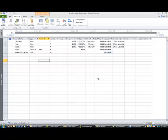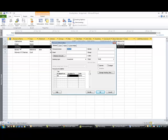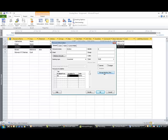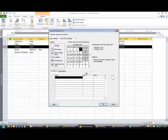The other thing that you would enter on this sheet is any details to do with each resource's holidays or training days that will affect the project. So you've been told that Andrew's on an in-house training day on the 5th of January. So if you double-click Andrew, you will get his Resource Information. So here on the right-hand side you see the Change Working Time, which is the calendar assigned to Andrew. If you click on that, you'll note up on top that he's using the Office Move calendar, which is the calendar you'd expect him to use because that's the calendar for this project.